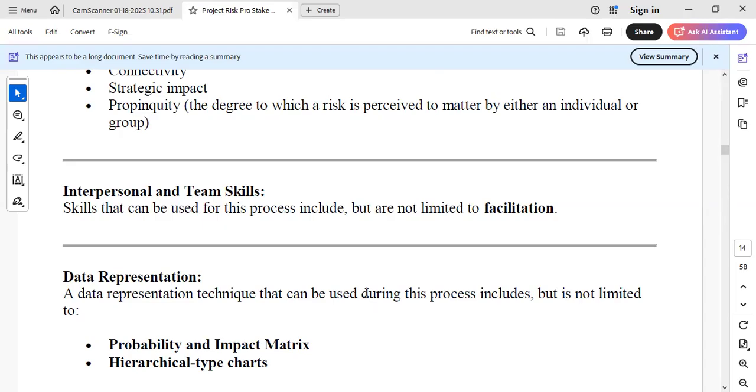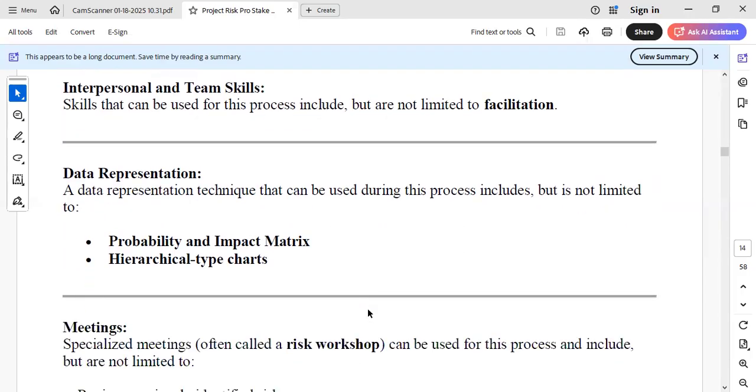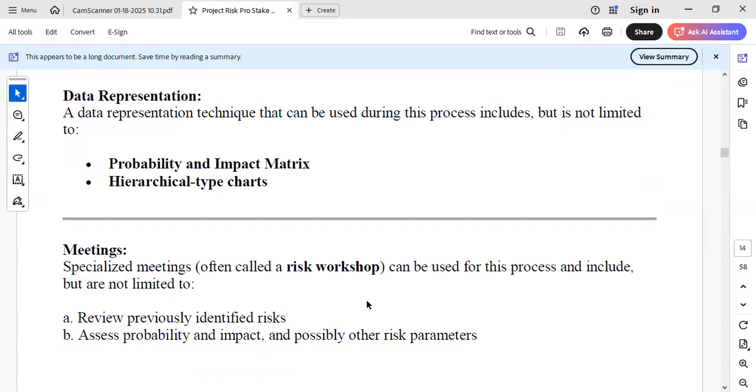And if you want to organize this hierarchical list based on the functions, the departments, the areas of the project, the phases, you may have a risk breakdown structure, RBS, where when you pick an area of your project, you can see that this particular risk is happening within this area, and this one within this area. As you keep cascading the work breakdown structure down, in each activity, in each work package, you would be seeing the identified risks found in there.